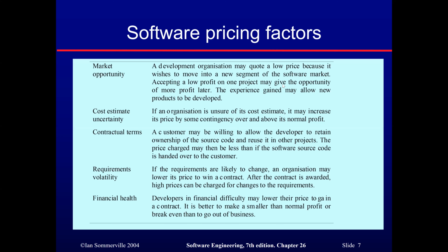Well, what are the most important factors that affect the software pricing? For example, the market opportunity. A development organization may quote a low price because it wishes to move into a new segment of the software market. Accepting a low profit on one project may give the opportunity of more profit later. The experience gained may allow new products to be developed.